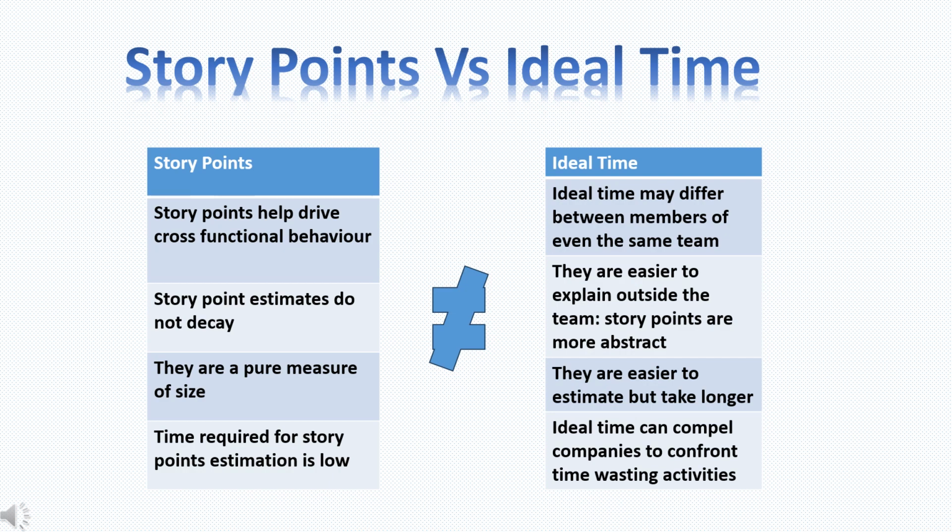It's hard to make the switch to get that on the front end, but once you have a bit of history, the business folks and the other stakeholders are going to become very confident in the estimating that you come up with up front. Another point worth mentioning is that the team should periodically revisit their estimates and revise them as the project progresses. This is because the team actually gets better at sizing their stories.